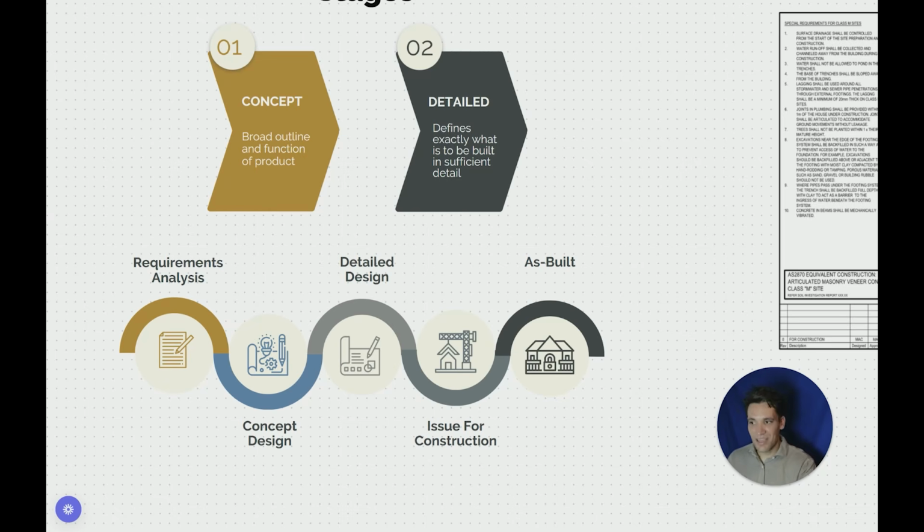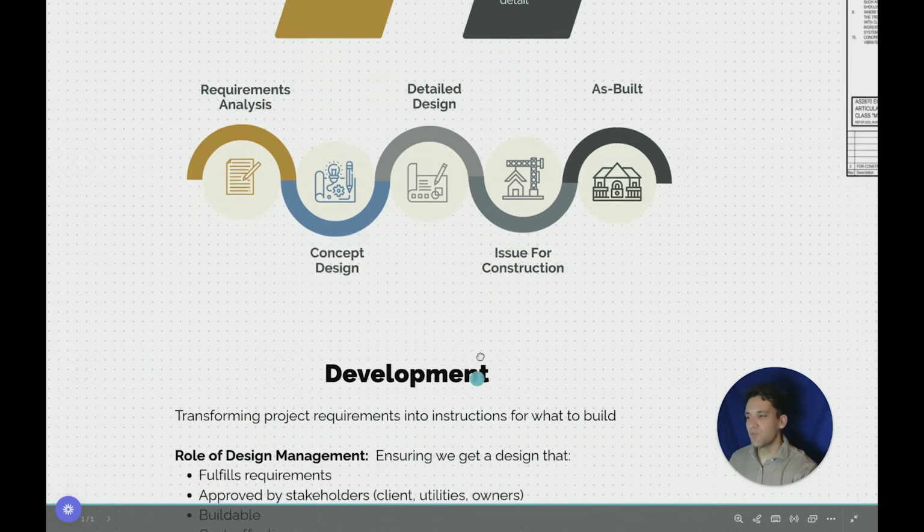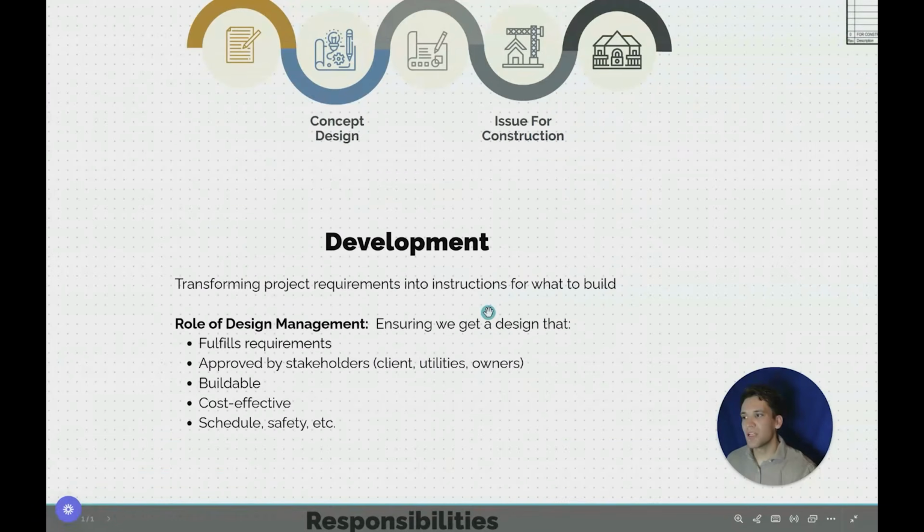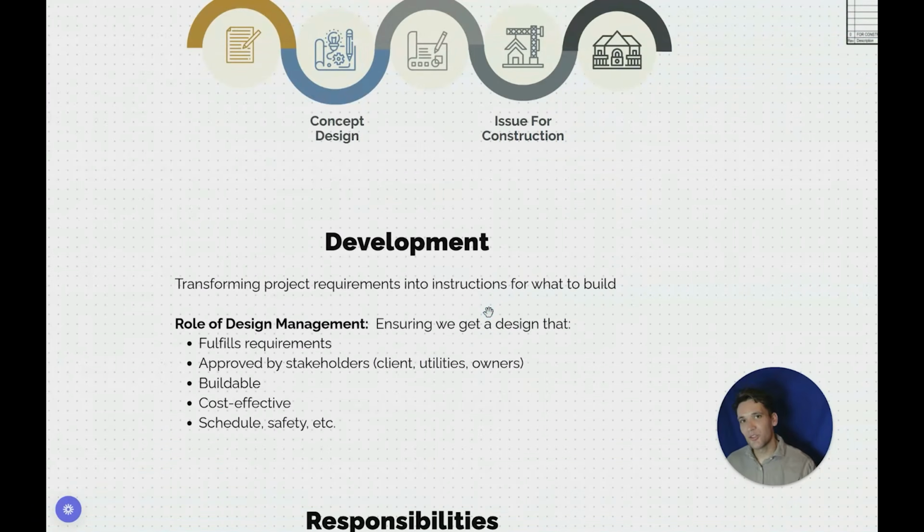Typically design development, we'd say, ends with issue for construction, but it's important to note that most projects will also do an as-built stage of the design where they create a new revision of the drawing, capturing any construction changes. Okay, so development is really about transforming project requirements into instructions as to what we build. That's what it's really about.